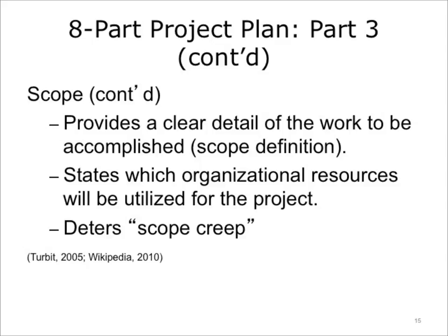Should identified work arise that falls outside of the defined scope, it becomes the project manager's responsibility to determine whether the additional work falls out of the project's scope and should be deferred, or whether the scope of the project should be expanded to include the work. Expanding the project scope would mean making formal changes to the work plan, resource allocation, budget, and/or schedule.